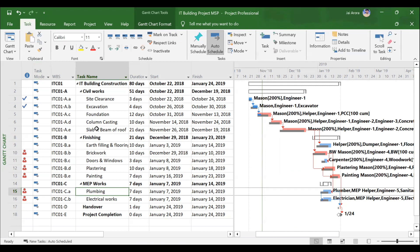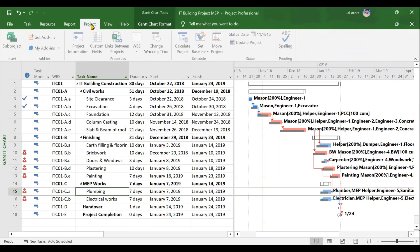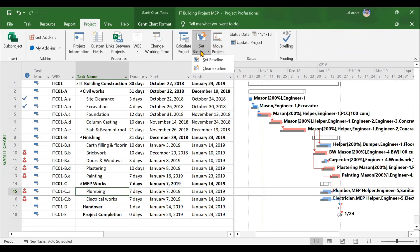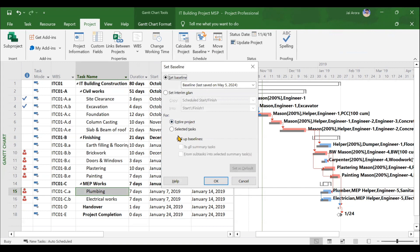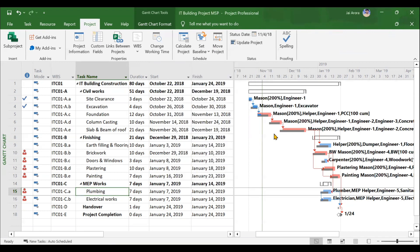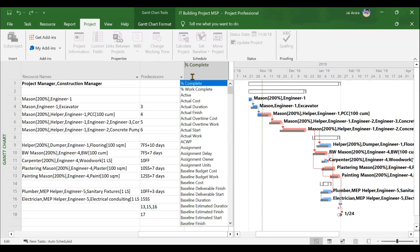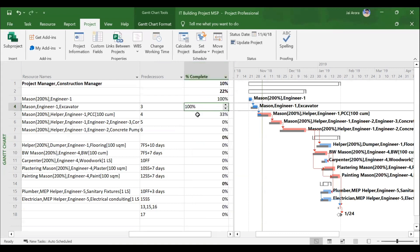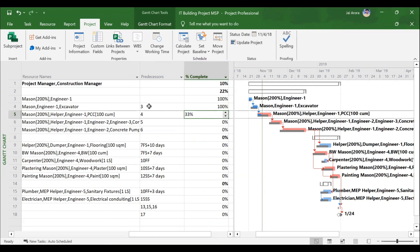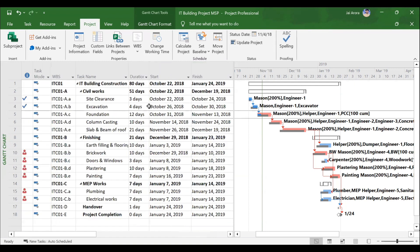After that, we will move to creating and assigning baselines. In the Project menu there is an option called Set Baseline, where you can set a baseline for the entire project or for selected tasks. This is the first step to updating progress — you must first assign the baseline. The gray lines visible in the Gantt chart are the baselines. After assigning the baseline, it is time to update the progress of the project. You can add a percentage complete column and update percentages for activities — for example, some activities are 100% complete while others may be 33% complete.